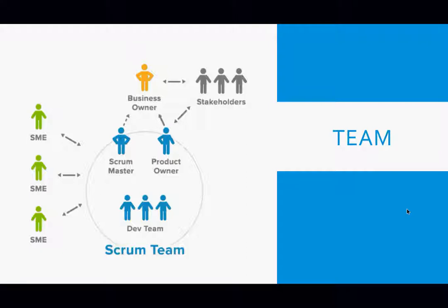You have two types of backlog. One is the product backlog, which is everything that you need to do for that particular product. You will also have a sprint backlog. From the product backlog, you bring other things into the sprint. So for instance, in your product backlog, you can have maybe 500 items to be developed.